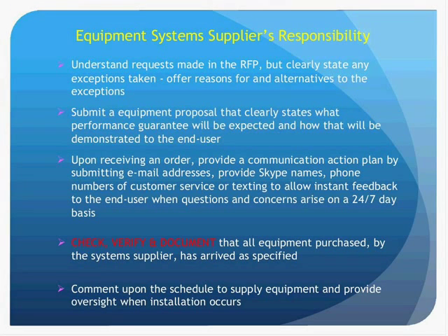Every situation is fluid. While an RFP may be issued, the actual requirements may change over time as more is discovered about a particular project or particular opportunities to perhaps reduce the waste volume. Proposals generally include, these are proposals from the equipment supplier, a description of the technology proposed, the chemistry involved, a schedule for equipment delivery, and if included, installation, various costs, the terms of payment, useful references for the end user of similar systems provided by the equipment supplier, and the equipment return policies and business procedures.